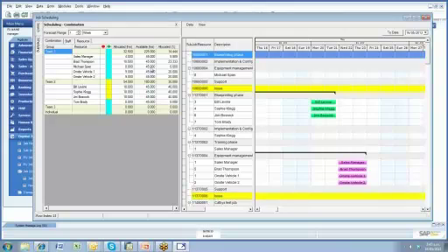That's up to you. Behind the scenes, we have a calendar. We have a company calendar that says, we start work at this time in the morning and we finish at this time in the evening, so we know how many hours we have available. And each staff member will inherit those hours from the company calendar. So you'll see they're all getting the 45 hours here.